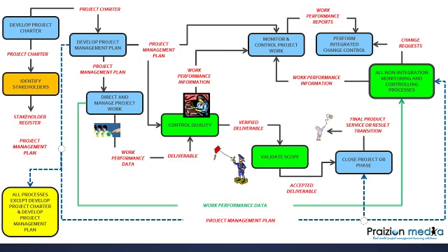Everyone is happy. But take a look at this other very important overarching concept in the PMBOK guide. This is the WPI pipeline. The WPI pipeline leads to one process and one process only: monitor and control project work.